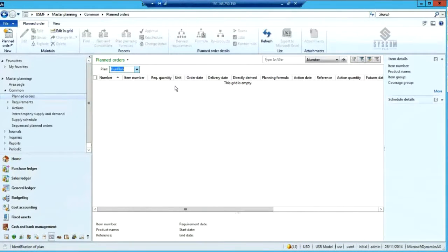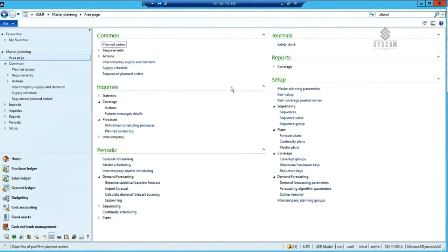And then by running MRP, it will create the purchase orders and works orders needed for each and every stage of the project automatically. If you decide to change the date of when that particular project is scheduled, AX will also alert you to make a replan and suggest what you need to do with the purchase orders. It will automatically move works orders if they've not yet been released to match your new requirement. And then AX will help you maintain that control.